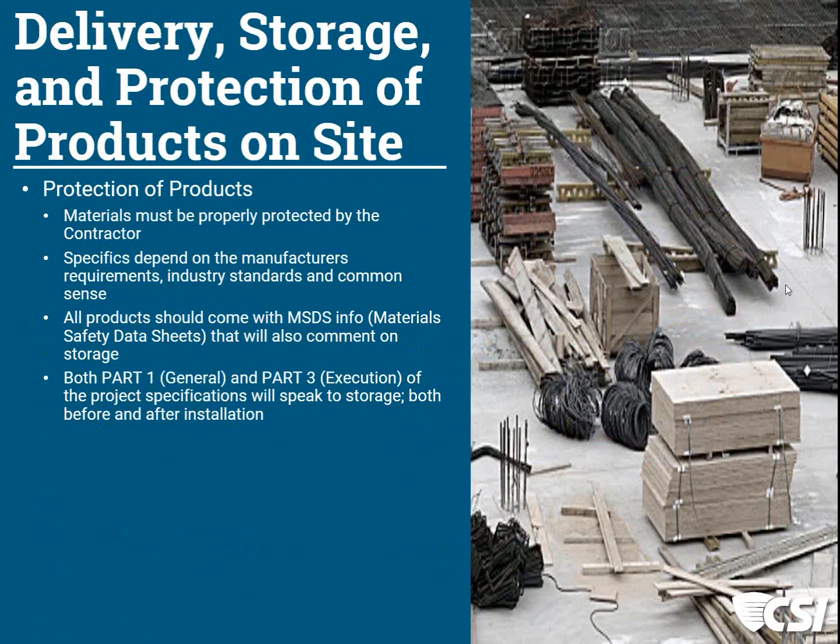I'll use an example of what prompted this in the firm I was working with. Sheetrock. So when are you going to finish it? How is it going to be protected after it's installed and it's below freezing? And so this firm decided, you know what, we're going to spend a lot of time explaining what we expect with the storage, delivery, and protection of materials. And they created a whole specification section that was supplemental just for that, and listed various parts, being sure they didn't change anything that the manufacturer's requirements would note, but adding how serious, I guess is the way I should describe it, how serious they were about the protection of those products, because it's critical.